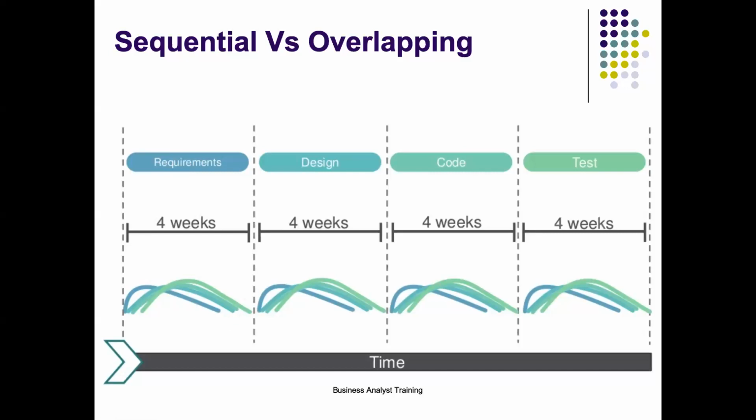Again, we will learn in detail that whatever portion we do in each 4-week iteration, we have to make sure it can be independently developed and tested, right?